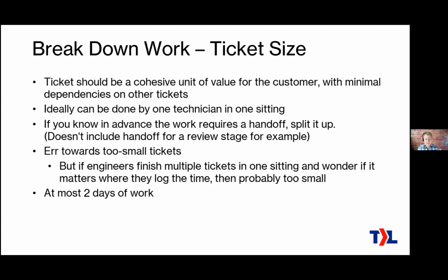Sometimes I've seen lots of tickets. I think they've got maybe like 80 hours logged on a certain ticket, and when that happens, that's not realistic. Nobody has any idea what's going on with that ticket when it's got 80 hours there. There's no way for you to just look at that ticket on the board and understand what this means for our project moving forward or not moving forward. So the ticket's got to be way smaller than that.